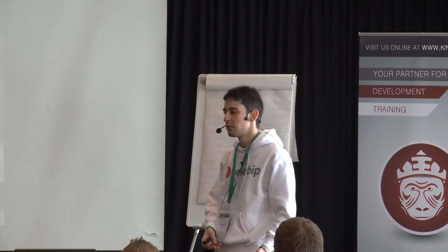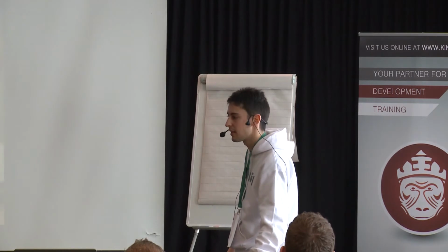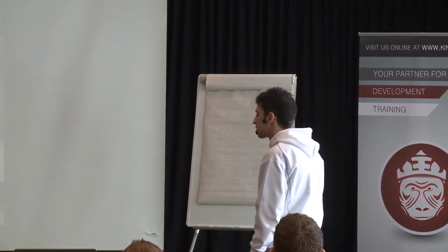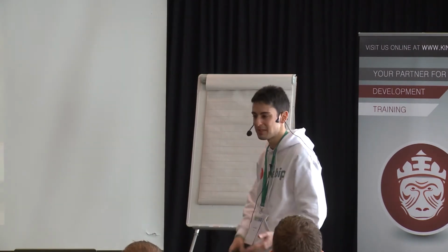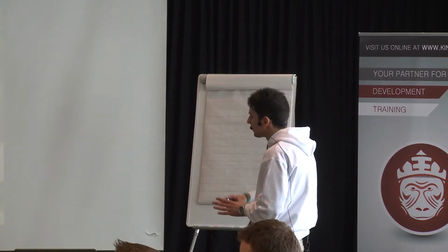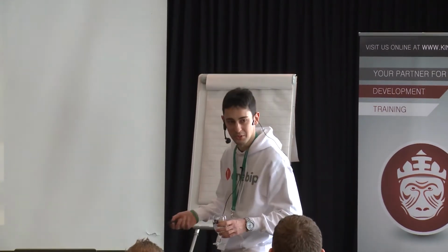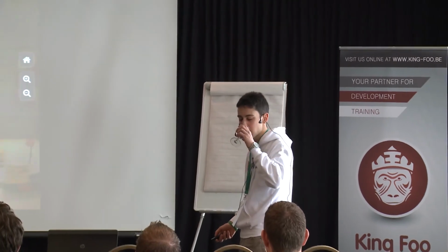So that is how I deal with emergencies if someone wants to void your Pomodoro every time. You create an ER section and put some people in by rotating them, because it's something that annoys developers, so you have to rotate them periodically. And they will shield the rest of the team from these interruptions. This is the best you can do. Of course, if you have a better solution, I will be glad to hear it.